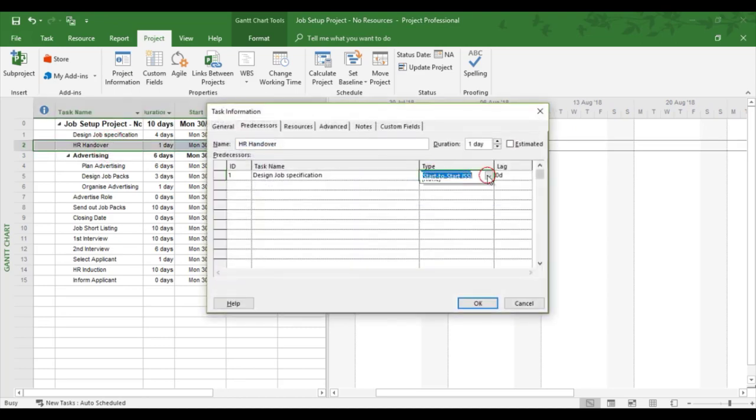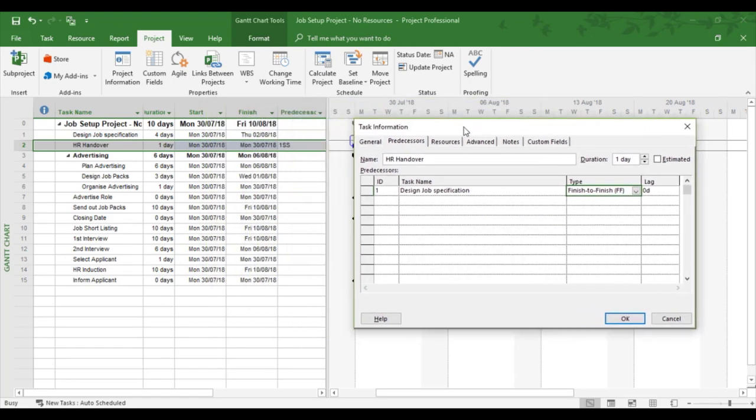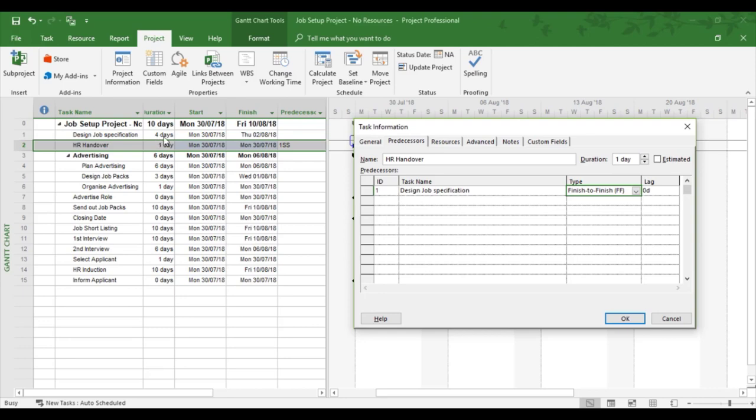Next one, finish to finish. So they both finish at the same time. And this is in accordance with the length of either the predecessor or successor. So in this example, the second task, which is the successor task, will finish with the predecessor, because the predecessor is longer.